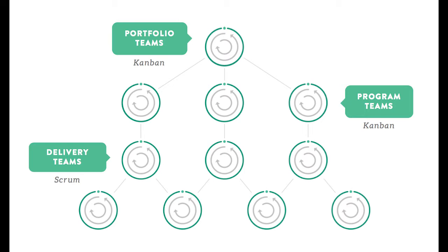Above them, we often find something called a program team. And when you think about Scrum and you think about the role of a product owner, think about large, complex organizations where you have architectural dependencies, you have organizational dependencies. A single person being able to manage all that becomes very difficult. So we tend to create a structure in organizations where you have, again, a cross-functional team at the program tier that's responsible for creating the clarity in the backlog, also coordinating work across teams. So if we have dependencies from a team perspective or an architectural perspective, for the team to work out those dependencies within a sprint, it's too late, right? We're reactive. So we want to make sure this tier is helping us from that perspective.